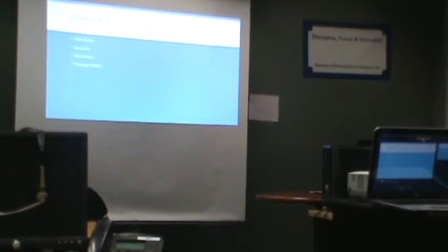Okay? Another key thing, and I'm glad you made that point, Krista, because it reminded me to bring something up. Change orders do not go through sales. PMs do change orders. Once sales sells a deal, they got a signed SOW and they got a change, a sales to ops, they're done. Sales should never hear about that deal again, and we should never need anything from sales again. Project manager owns it, cradle to grave. Okay? They own change orders. Don't need to go to sales to get change orders.